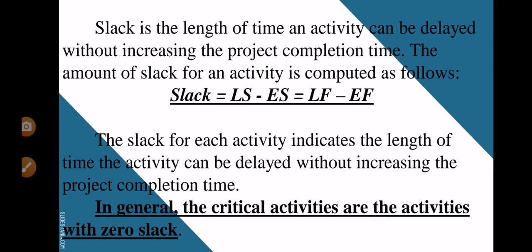So next is slack. Slack is the length of time an activity can be delayed without increasing the project completion time. The amount of slack for an activity is computed as follows: slack is equal to latest start time minus earliest start time, or latest finish time minus earliest finish time. The slack for each activity indicates the length of time the activity can be delayed without increasing the